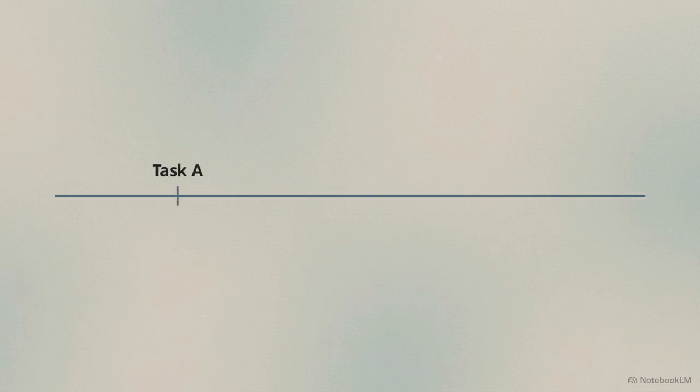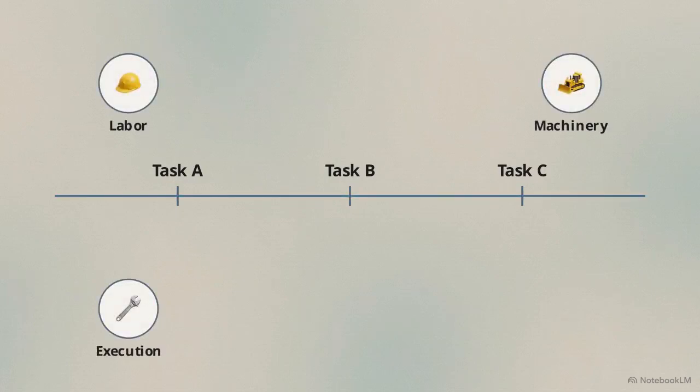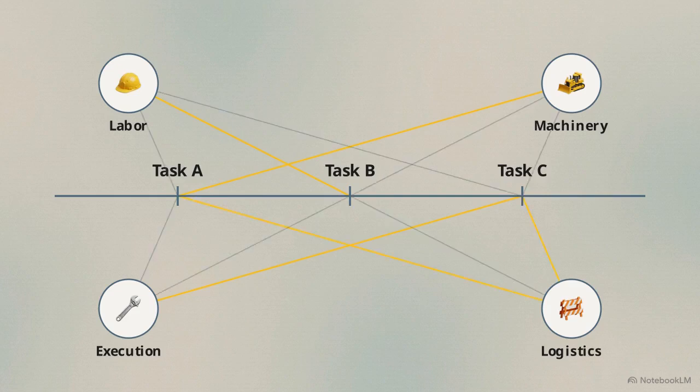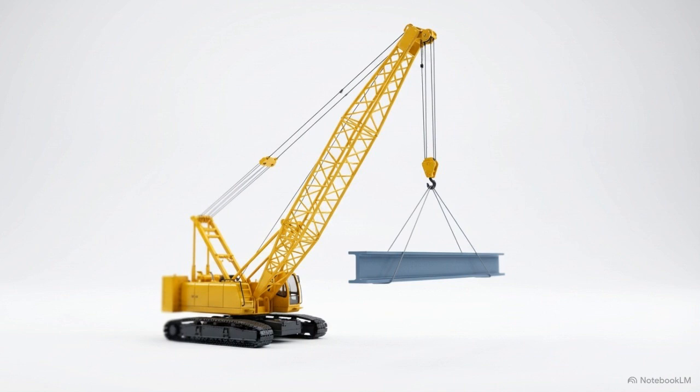Scheduling is a narrow, one-dimensional metric. It provides a simple timeline of when tasks should theoretically happen. Planning is the comprehensive pre-construction strategy required to execute that timeline. It dictates exactly what work occurs, who performs it, the specific materials and machinery required, and the physical constraints restricting the site. Relying strictly on a schedule assumes the job site operates in a frictionless vacuum.